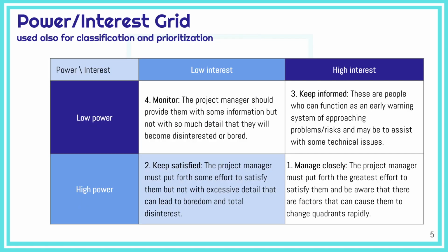One of the most important tools we went through in the session is the power interest grid. It can help not just with analyzing stakeholders, but also with prioritizing stakeholders and knowing how to deal with them, how to handle them. For high interest, high power stakeholders, we need to manage closely because these are the most important stakeholders. They can be decision makers, and we need to keep them aware and updated, and also collaborate with them really closely.